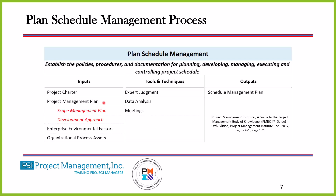Here is the schedule management plan structure according to the sixth edition of the PMBOK Guide. First, the project charter is going to be a contributor because in the project charter it will identify milestones we have to meet — when this project has to be finished or when certain things have to be delivered. It may have other constraints as well. We're working on the project network diagram, so we know what our WBS and WBS dictionary will contain.